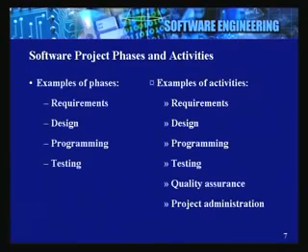Now, let us take design as an activity. The design activity is dominant during the design phase. But in case you find some mistakes, the requirement activity may have to be repeated during the design phase. So and so forth for programming, testing, quality assurance. So, project management, quality assurance, estimation, these things never appear as phases. They are activities which are undertaken probably in all of these phases. Individual activities may overlap in several phases, but the phases normally don't repeat.